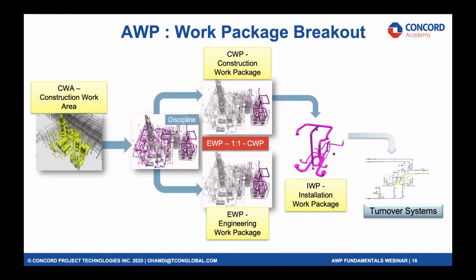The objective is to end up with the installation work packages, which are broken down so that the crew could, let's say, do about a week's worth of work. I've seen actually less and I've seen more, depending on the size of your project and the nature of the work and the nature of the discipline. But it is up to you, within your site and within your construction experience, to define that size.